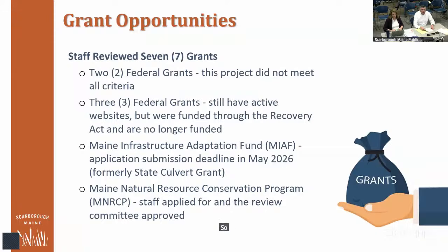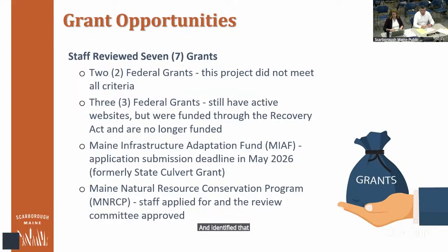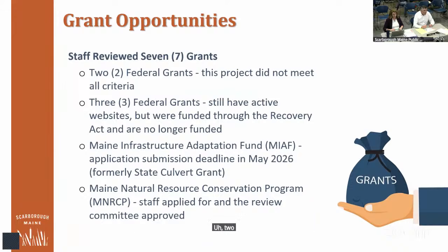So we almost immediately embarked on exploring what the grant opportunities are and identified that initially there were 7 grants. Pretty quickly we realized that for 2 of the federal grants, this project did not meet the criteria for one reason or another. And 3 others were still seemingly available, but they were no longer funded. So fairly quickly we worked through and realized that we're really focusing on 2 grants,